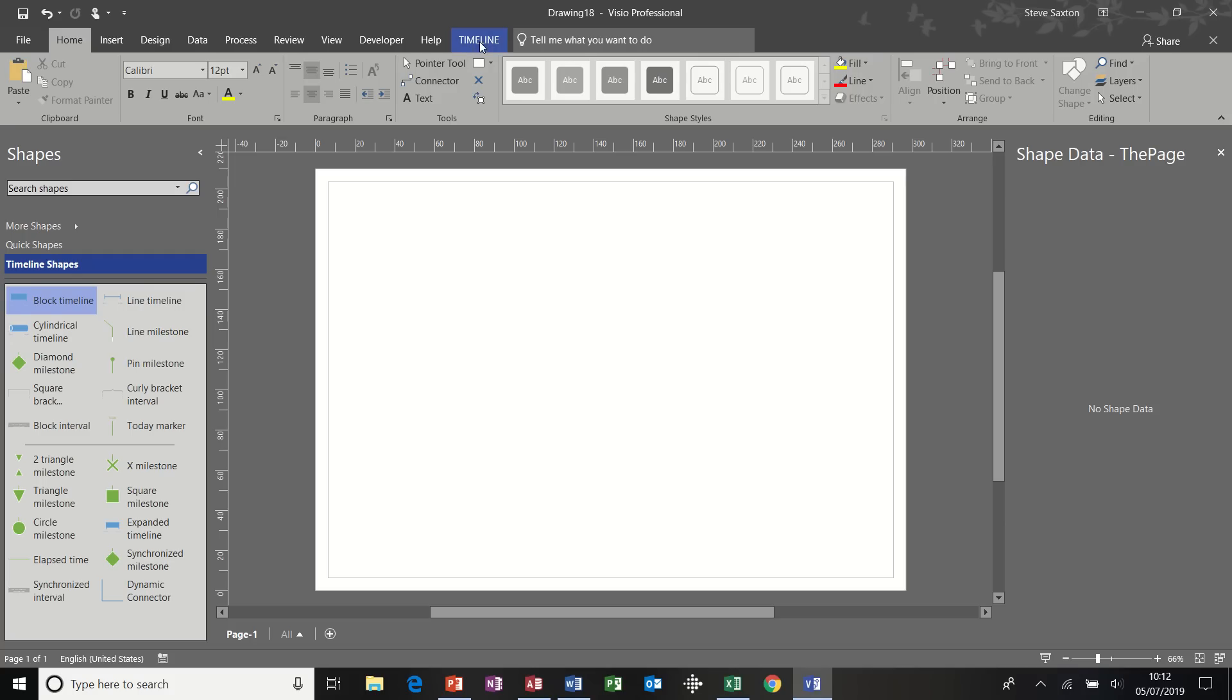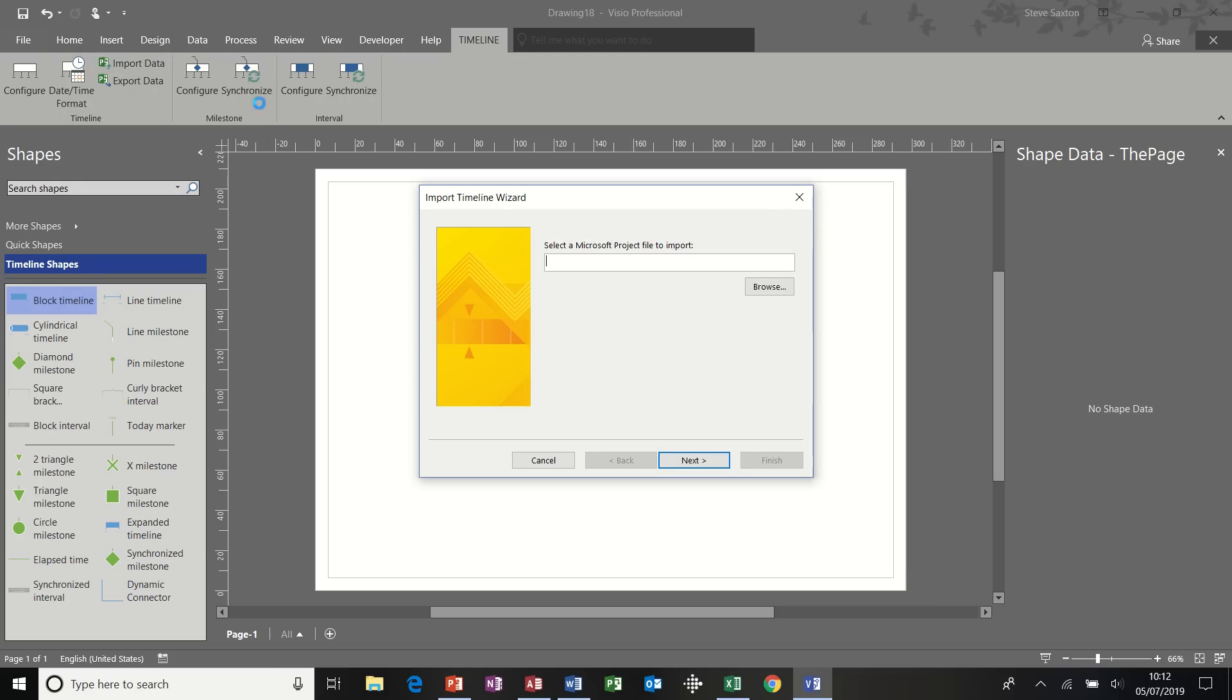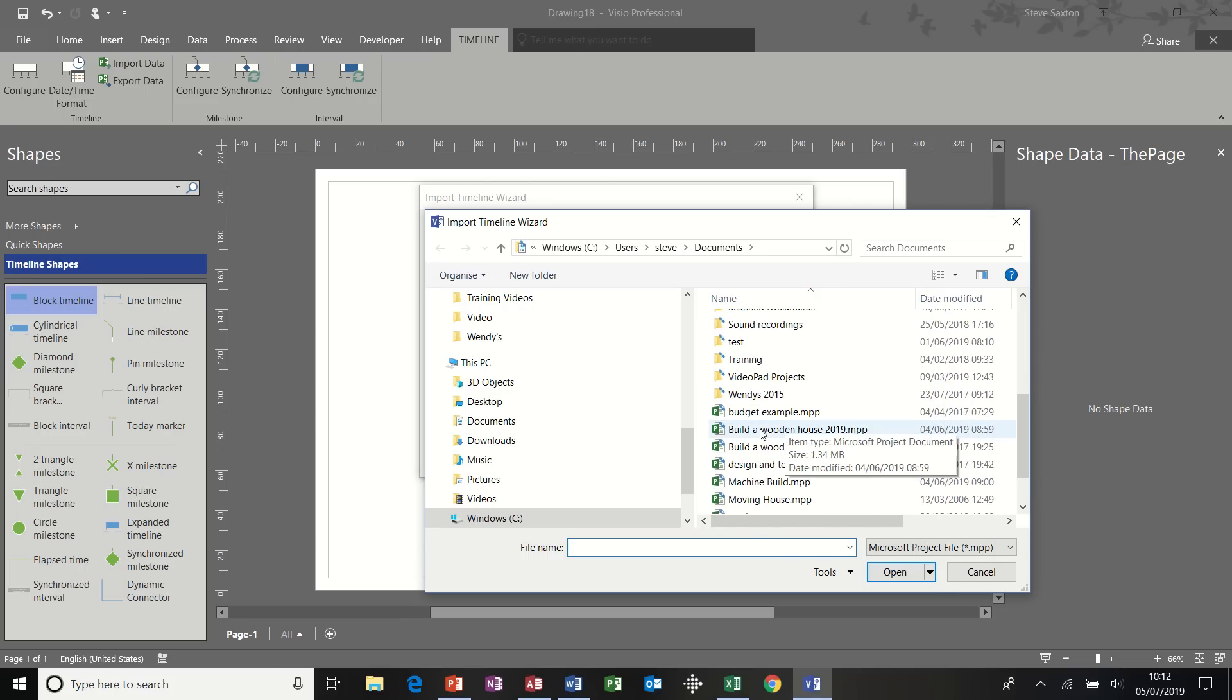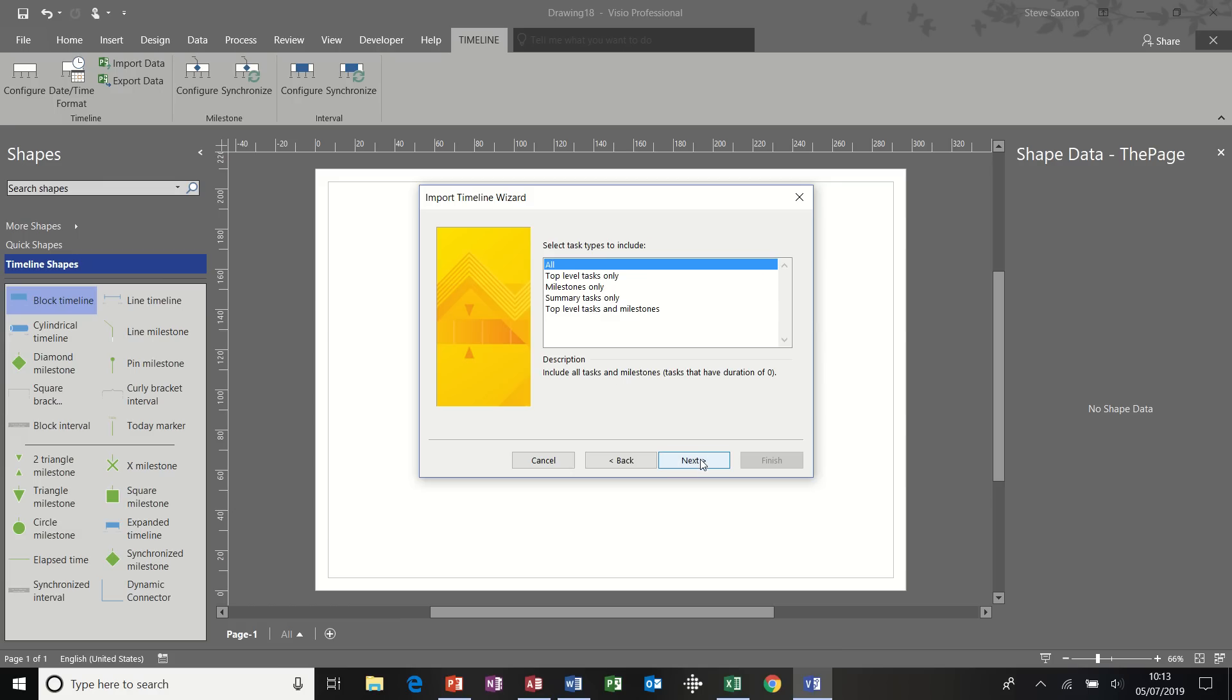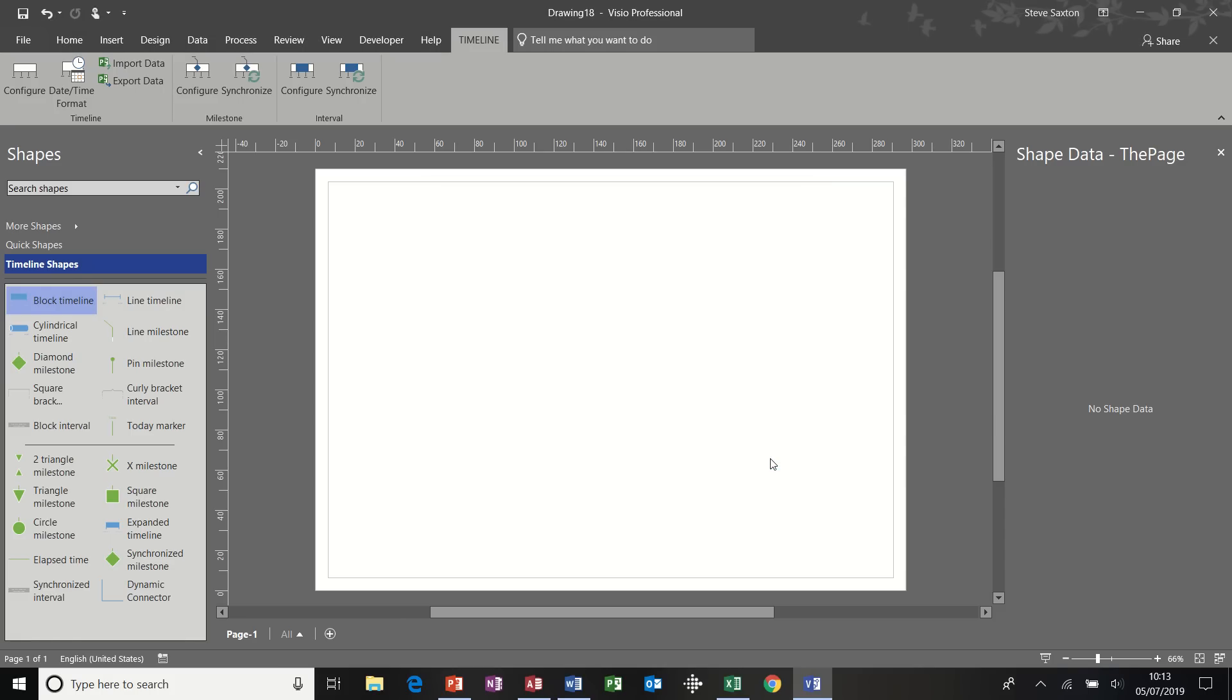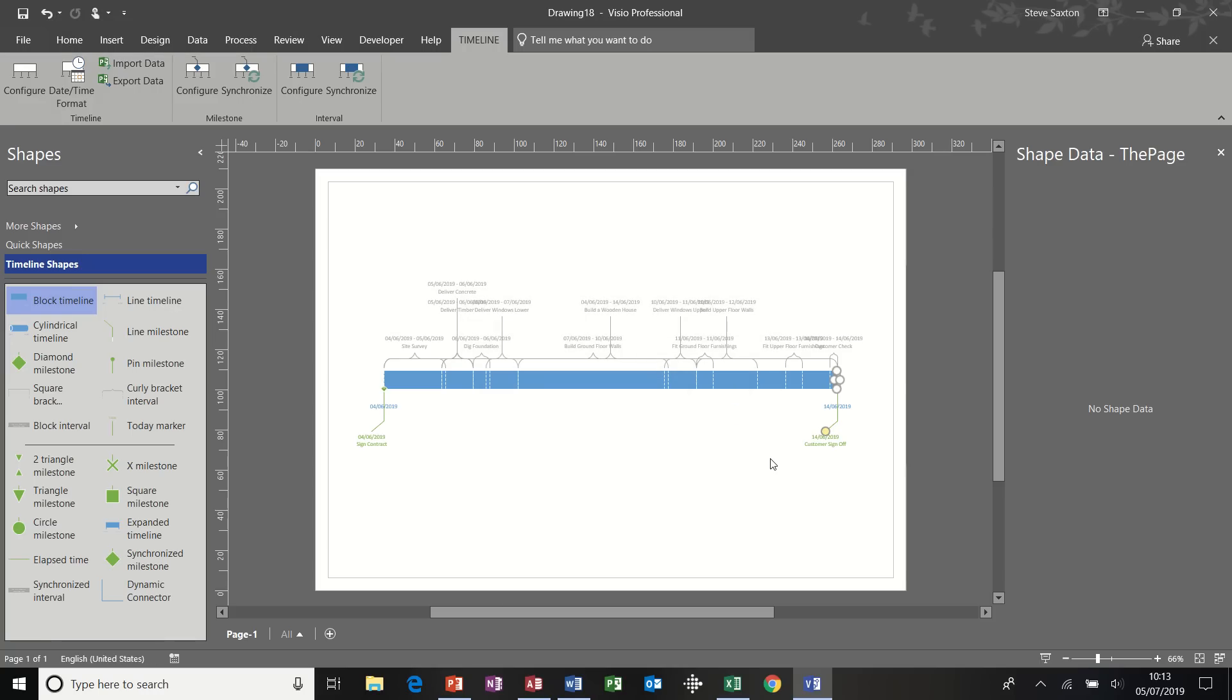To do that on the timeline tab on the ribbon, you have an icon, a little Microsoft project icon, import data. Click on that and then select the file that you require. So, down here, build a wooden house. Double-click that. And then I'm going to follow the wizard through. And I am going to leave everything on the default settings for this example. So following it through next to the end finish. And then the wizard would generate the timeline based on the fields and the information in the Microsoft project file.